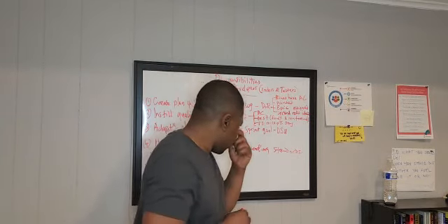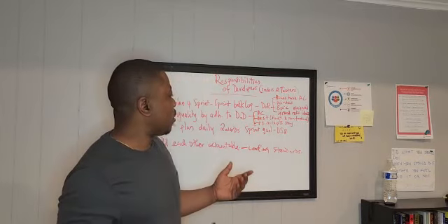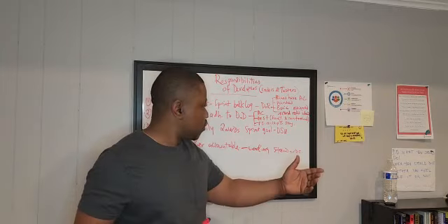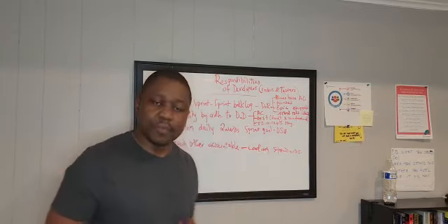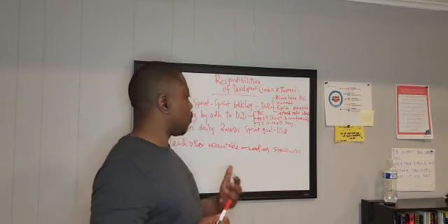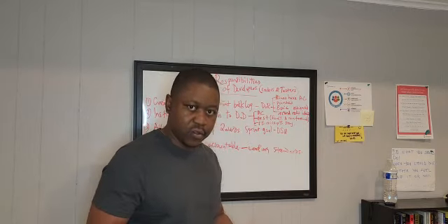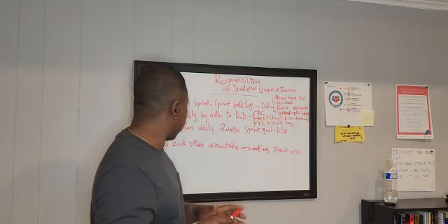Then secondly, that code must have been tested at least in a QA environment. Functional and non-functional tests should be carried out on the code that has been written. Then at least the PO must accept the story, that yes, this story meets our definition of done and it meets our acceptance criteria. So I can visa that this story has been done.